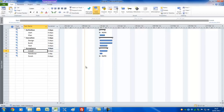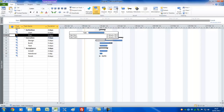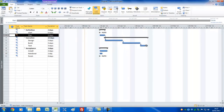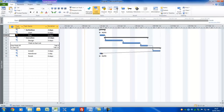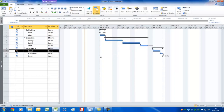Now let's link these tasks together. I'll use the standard method of dragging from one task bar down to the next — linking each consecutive task in the chain. I'm showing you this technique so you get used to using it. If you overlay the mouse very carefully on the link arrows and double-click, you can adjust the way in which they're connected.